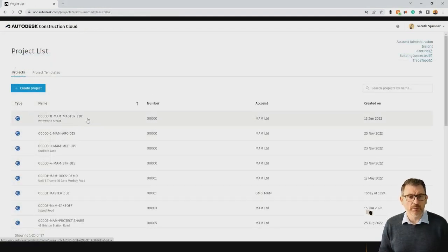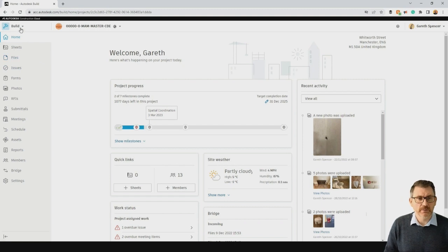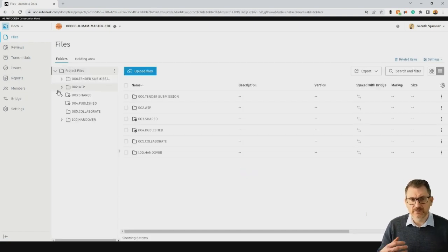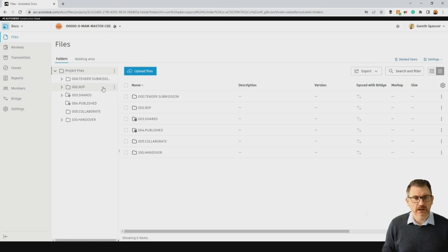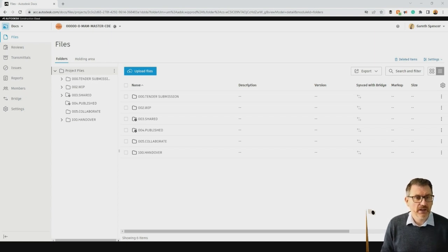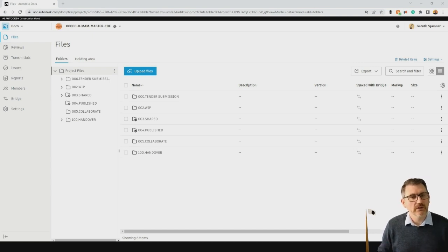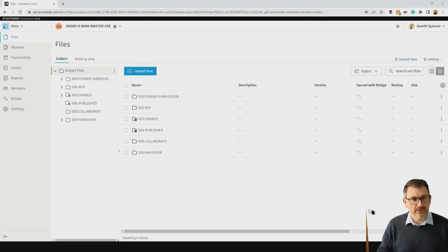I'm going to open a project set up as a project CDE. As we've got both Build and Docs here, you'll see it opens in Build initially. Moving into the Docs environment, because we've set this up with a WIP area, a shared area, and a published area, this allows us to align to ISO 19650 workflows. The work-in-progress area is for people to access live project files; the shared area is for sharing information between parties; and the published area is for contract information or end-of-project deliverables.